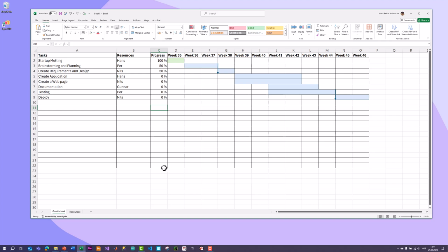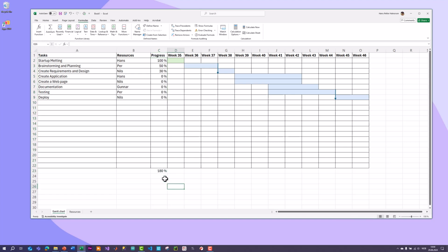So then I can also in the bottom here create a formula. Going to the formula, I insert some formula here. So instead of sum, I can just use the average. So using the average formula like this. And then you can type a text here, project status. So this means that now at this point, according to this progress we set here, the total project is 33% finished.